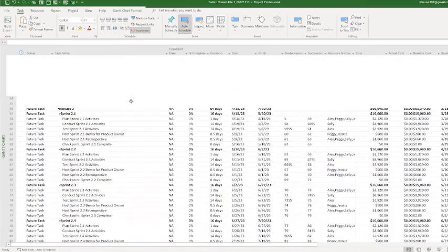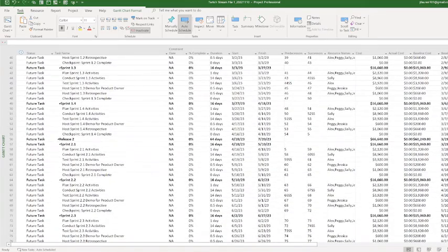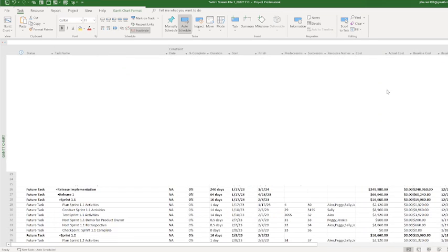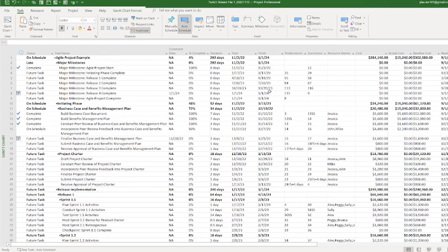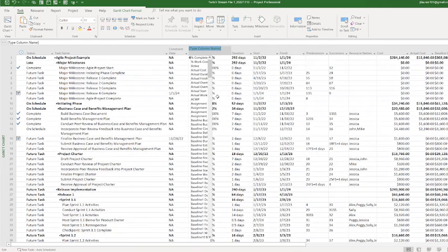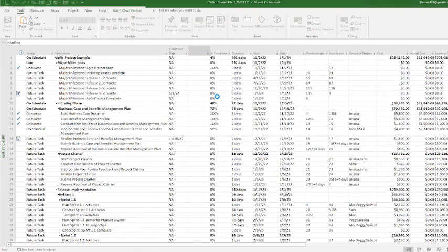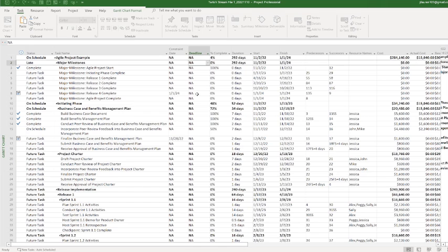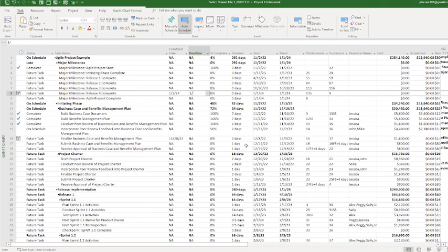And as you can see, as I'm trying to scroll, because everything's taking forever, now I am at my 1/1/24, which is the release 4 milestone. If I wanted to really see where my finish date is falling, again, I just use my deadline column and add in that deadline.